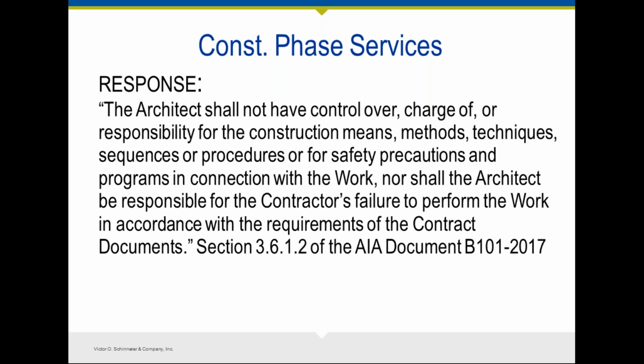When you face a client-drafted provision saying that you assume responsibility for the safety of your employees, the safety of others, or the safety of the public, and keeping the site safe, be very wary, because you typically do not have enough control over the site or the property to be able to assume that kind of responsibility, because you're there on site to do oftentimes a limited observation and take note of what's going on and leave.